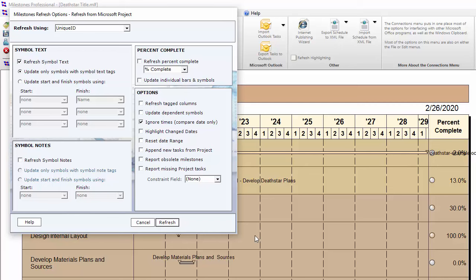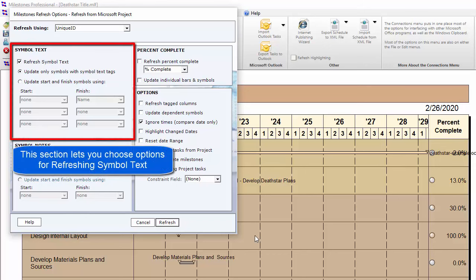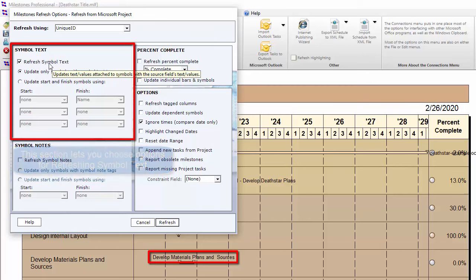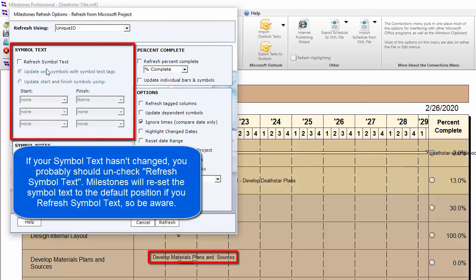Now you get the Refresh Options dialog box. There are a lot of options here and some of them can mess up your schedule if you're not careful. The first one is Refresh Symbol Text — the text on the various symbols. If your symbol text has changed inside your project file, you might want to check this checkbox. If it has not changed, you should probably uncheck it, because when it brings in that new text, it places it at the default position for each symbol, potentially moving text you've repositioned.